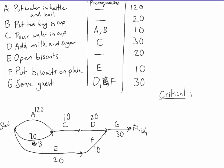Now, so the critical path then is the one that's taking the longest. And the longest is to go through A. The critical path is A, C, D, G, which is a 3 minute pathway. And what that is, is that's the best possible time we can do it. And that's the quickest we can do it. We can't make the kettle go any faster. So, it is going to take 2 minutes to do. And then the other things happen after it.